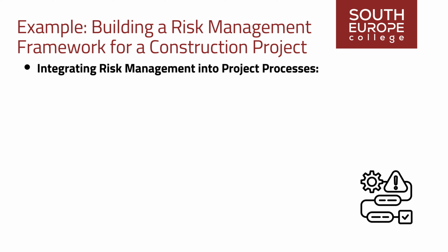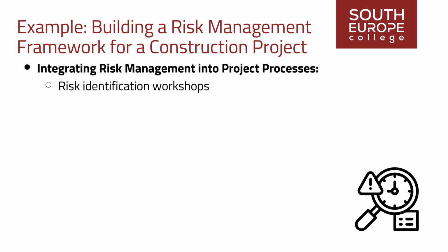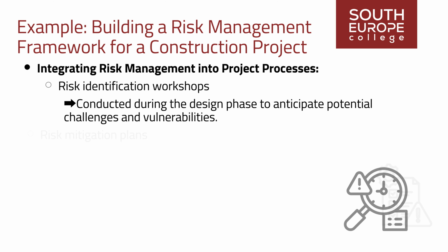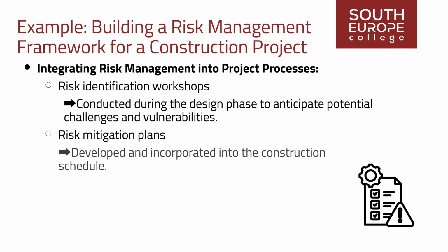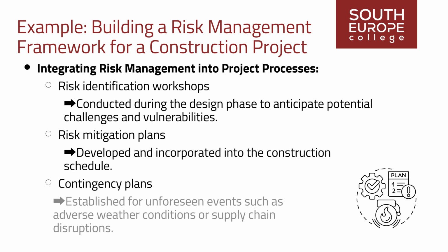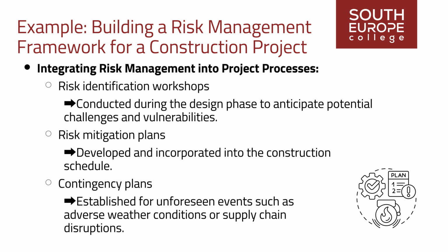Risk planning is integrated into the project's overall planning process. Risk identification workshops are conducted during the design phase to anticipate potential challenges and vulnerabilities. Risk mitigation plans are developed and incorporated into the construction schedule. Contingency plans are established for unforeseen events, such as adverse weather conditions or supply chain disruptions.